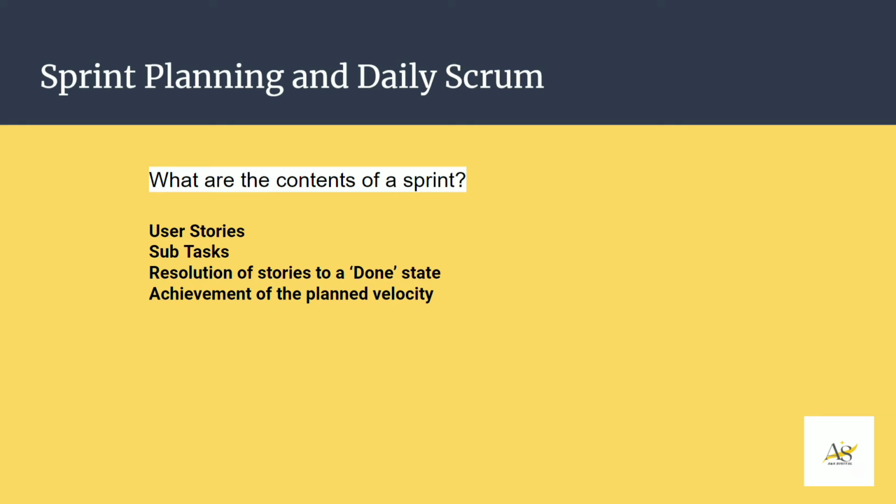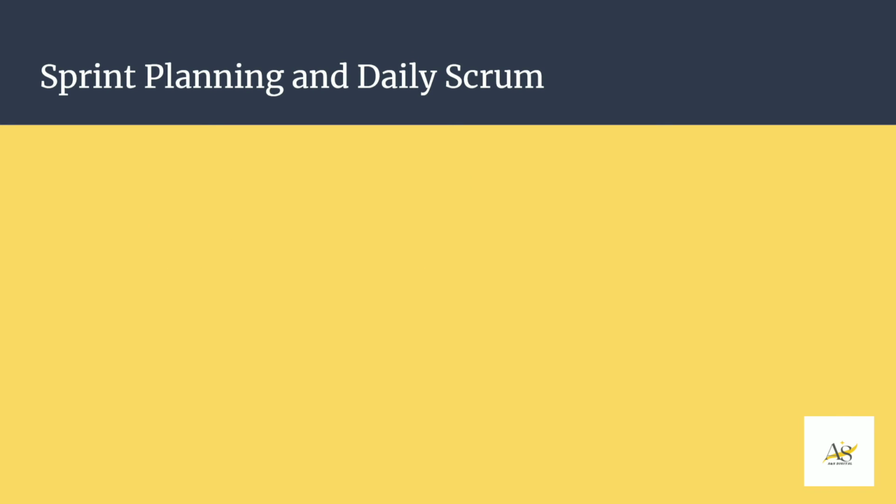And the poker session also talks a lot about that in detail. But today on sprint planning day, you actually want to plan out stories that equal your target or planned velocity. So sprint planning is the start of your sprint where you have a target or a planned velocity, and the achievement of that is the target of sprint planning.